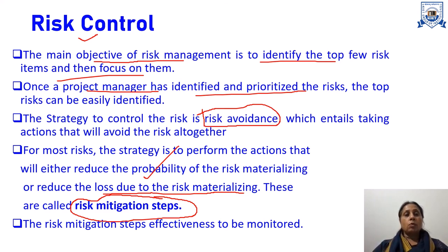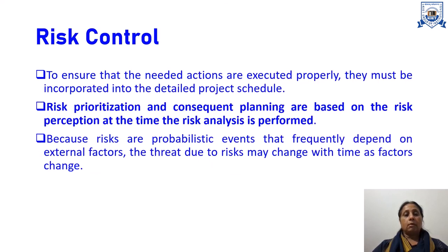So we have to monitor the risk mitigation steps from time to time. Risk mitigation steps are not static steps. This is a dynamic step, because if you do it statically, then once you identify the risk, it will be logged. So we do it dynamically, so that from time to time we identify the risk, assess the risk, and control the risk, because according to time the risk may change. It is not necessary that the risk will be the same at each time.